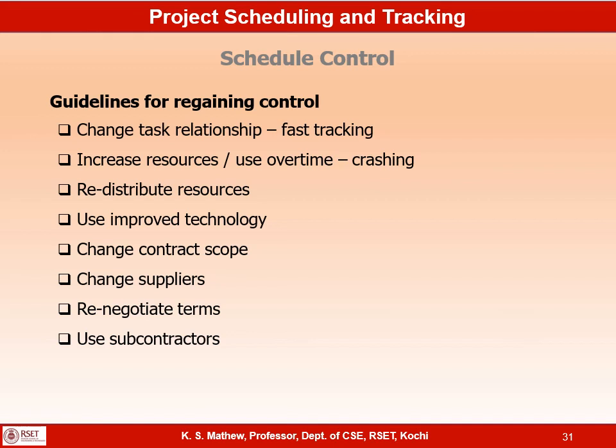So you negotiate with the supplier and say, we are going to change this contract slightly. Instead of a fixed price contract, we are going to have a fixed price contract plus incentive fee, where you will get the fixed price plus 2% extra for every 1 week of advance delivery.